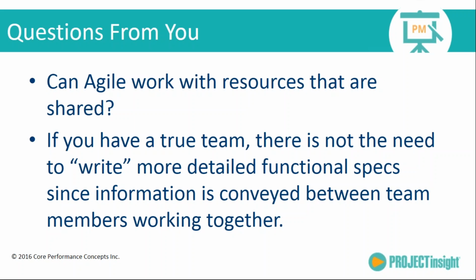So if you have a true team, and I'm defining a true team as 100% dedicated resources, if there's one person that comes in and out, then that kind of negates the whole thing. Because, in that purest sense of the word, you've got everybody in the same room, all working together. Of course, you're going to sit at the computer side by side, you're going to work through the issues. Do I have to write very detailed functional specs if we're all sitting in a room trying to solve it together? Absolutely not, but we better be documenting it afterwards.